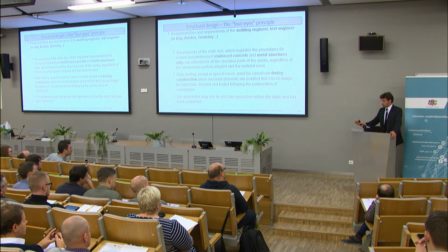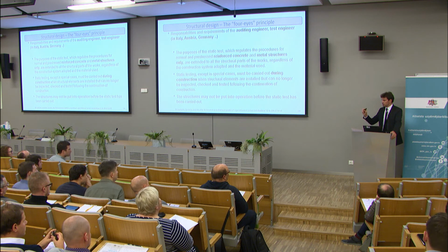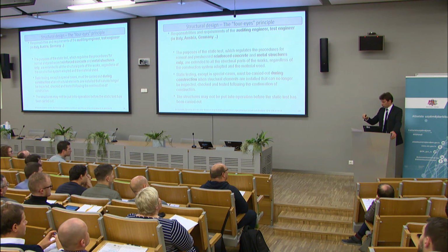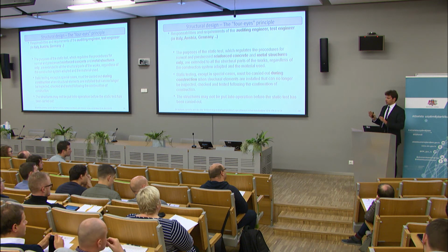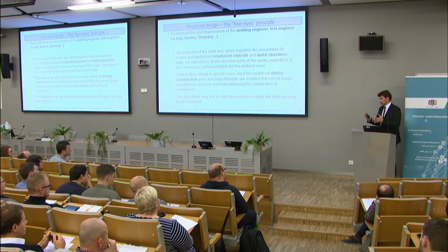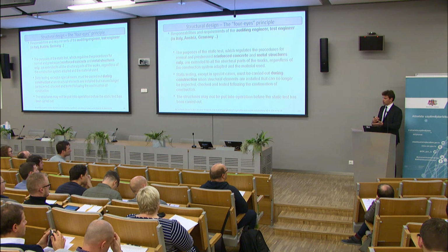It might actually be the same person, and sometimes it is, but they are two different things. The supervision during execution is another company. Usually, when the building is finished, this external reviewer goes to the site and checks the structure, and then checks the administrative documents and also the calculations.